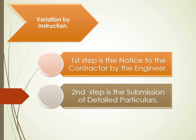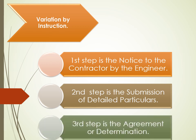If the parties have agreed to the omission of any work which is to be carried out by others, the Contractor's proposal may also include the amount of any loss of profit and other losses and damages suffered or to be suffered by the Contractor as a result of the omission. The third step is the Agreement or Determination. The Engineer is to proceed under Subclause 3.7 to agree or determine the extension of time if any, and the Contract Price Adjustment in accordance with Clause 12 Measurement and Payment.